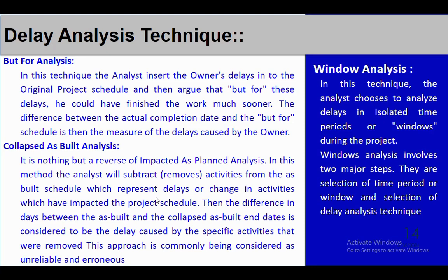Means he lays down the delay event that happened because of the client. He will insert it in the baseline schedule and rerun the schedule, and he will say that because of this delay event the project got delayed, or else he could have finished the project on time. So that, we call it but for analysis.